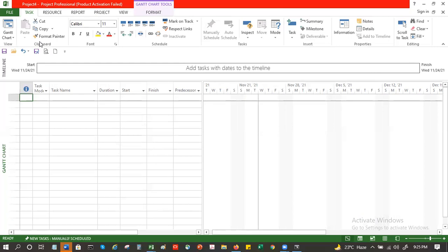There are still pockets in India, like in Maharashtra or around Bangalore or around Chennai, where they have holidays on different days. So your project might have a holiday on Wednesday, whereas Sunday is working. Now you have to tell MS Project that Sunday is your working day, Wednesday is your holiday. So how do you do that? You can do it by putting it in your calendar.